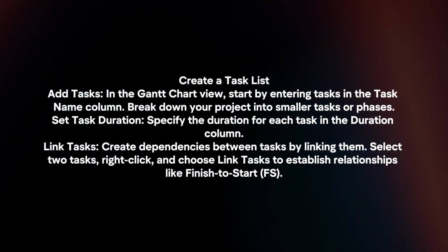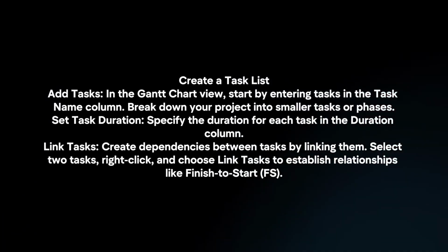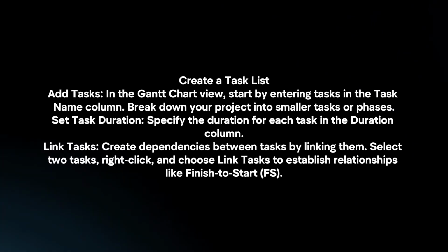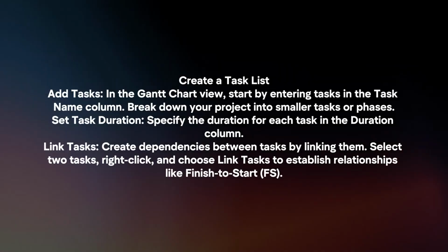Link tasks. Create dependencies between tasks by linking them. Select two tasks, right-click, and choose Link Tasks to establish relationships like Finish to Start.